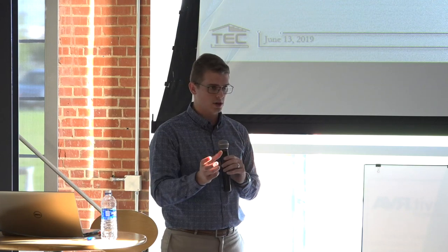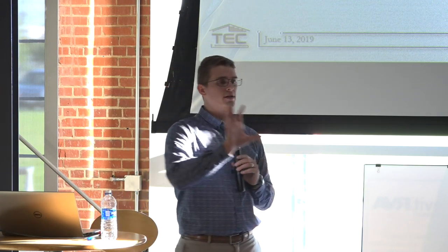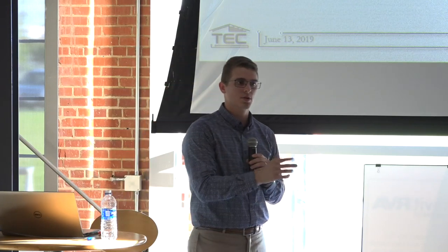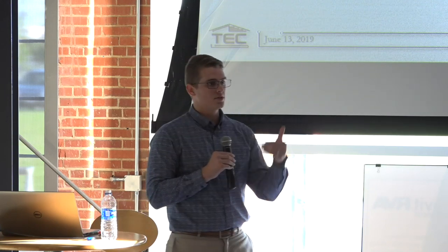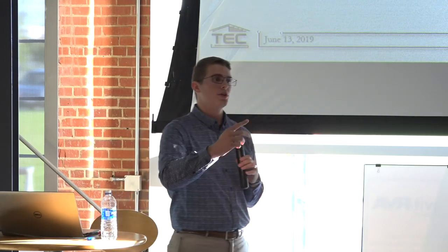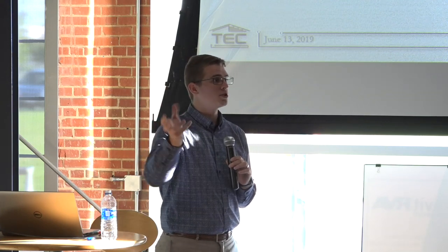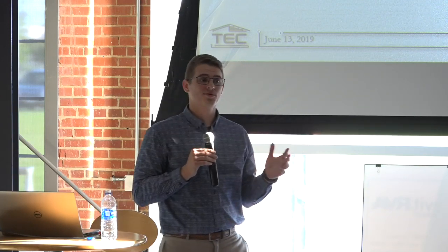So we did a lot of coursework design, and a lot of universities and different organizations are starting to find ways to bring this information into those other courses. So estimating is a great example. We developed a course flow where you do the hand takeoffs, because you have to know how to do that. Then you do it the traditional way with an on-screen takeoff or something like that, and then you do it a third time using the modeling software, where they're not actually creating the model, they're pulling the data from the model. So that's a good way of integrating it into that space where they can see, okay, just because you don't want to touch the model doesn't mean you can't pull data from it and it can't be useful.